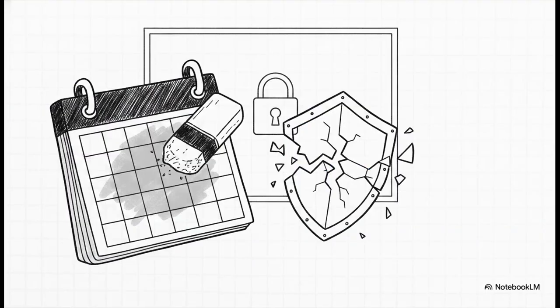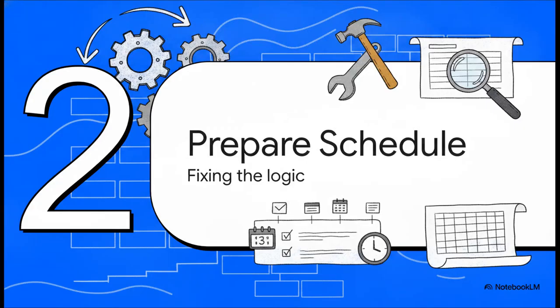Here is a hard truth, and honestly, it's a trap I see so many planners fall into. Just resetting dates without correcting the underlying logic creates an undefensible, quote-unquote, renamed copy, not a true baseline. It's kind of a lazy mistake. If you just override dates to make things look pretty without actually fixing the predecessor and successor links, your schedule will absolutely fail under an audit or claim scrutiny. You're essentially just erasing history without creating a valid new control plan. No way around it.